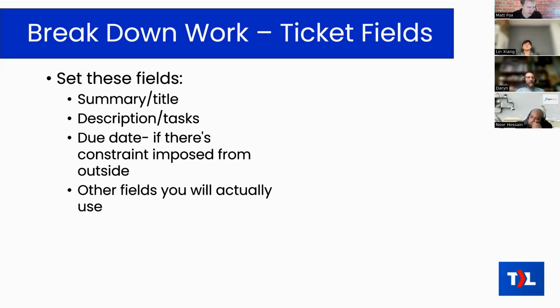So it would be a deadline. It could be that you set the deadline when you offered to do this project in a contract. Okay, that could be a deadline. It could be that there's a regulatory change that comes into effect on a certain date. It could be that it has to do with an event that's happening at a conference.